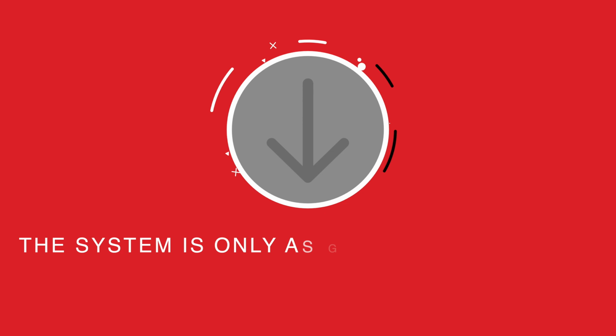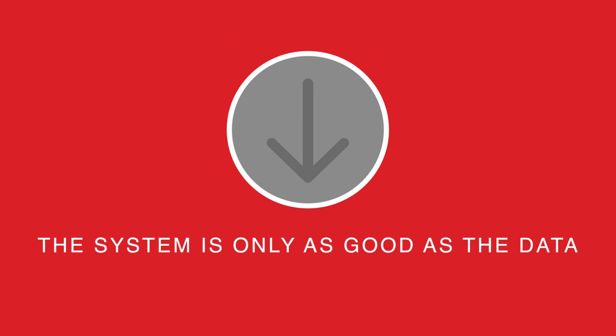Mistake number four is that any system that you implement is only going to be as good as the data within the system. So get into the habit of regularly updating tasks, archiving your inbox, checking the My Tasks section, and marking tasks complete as soon as they're done.